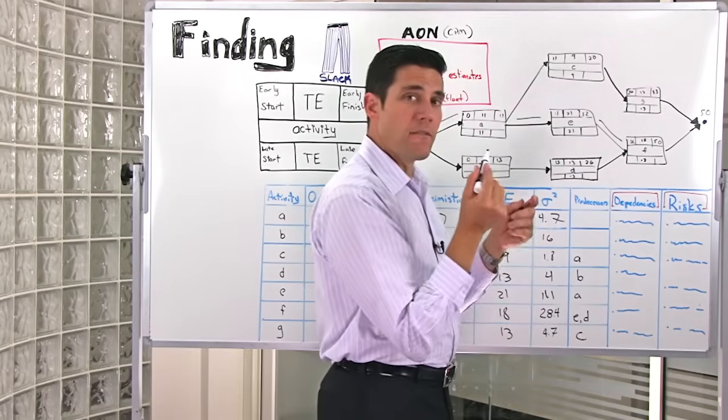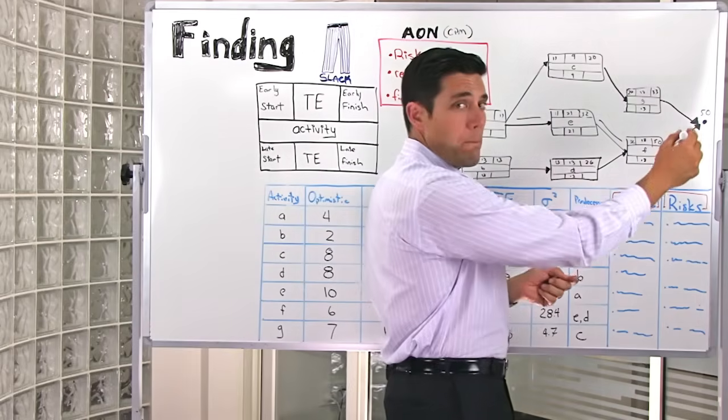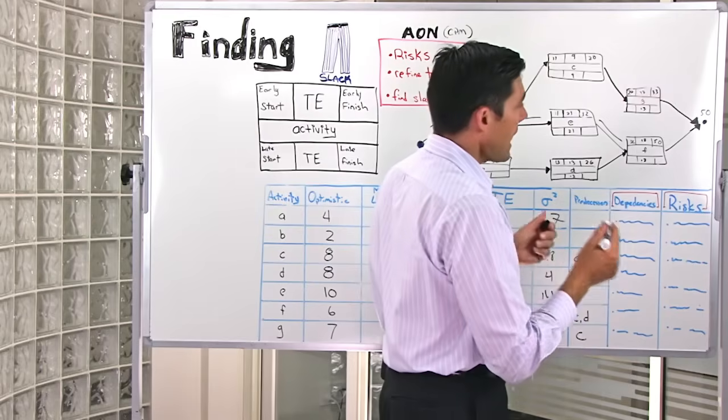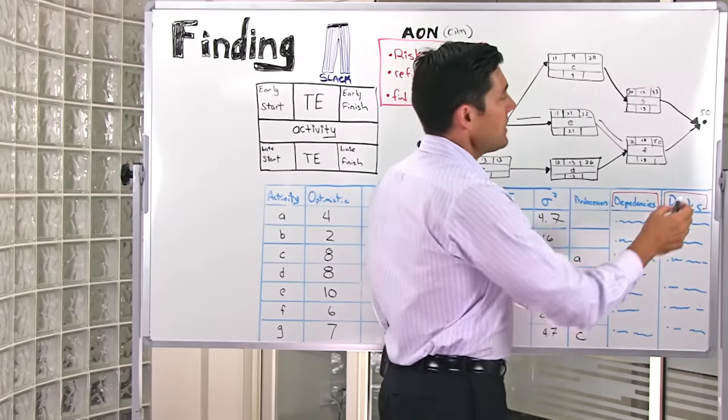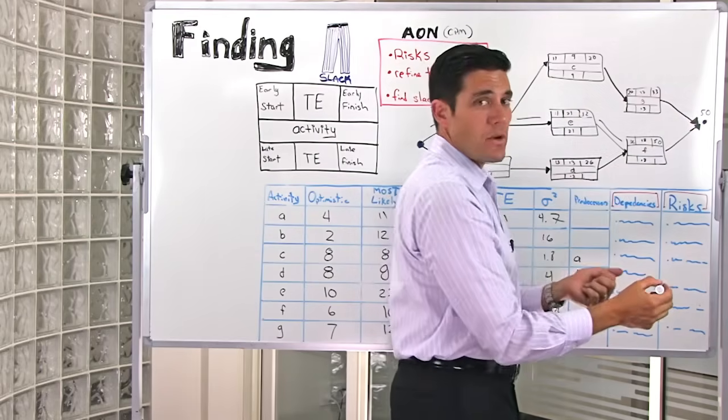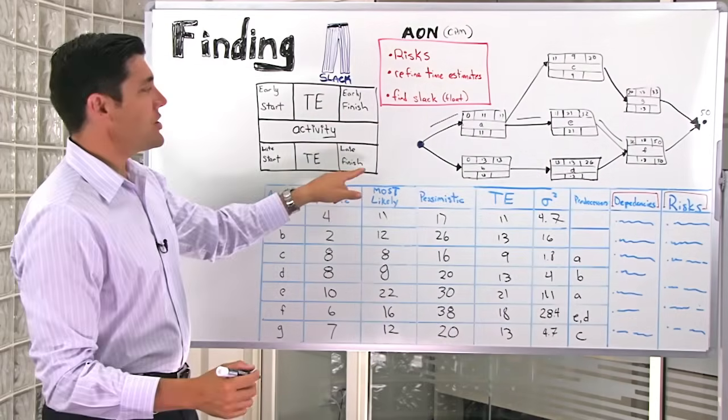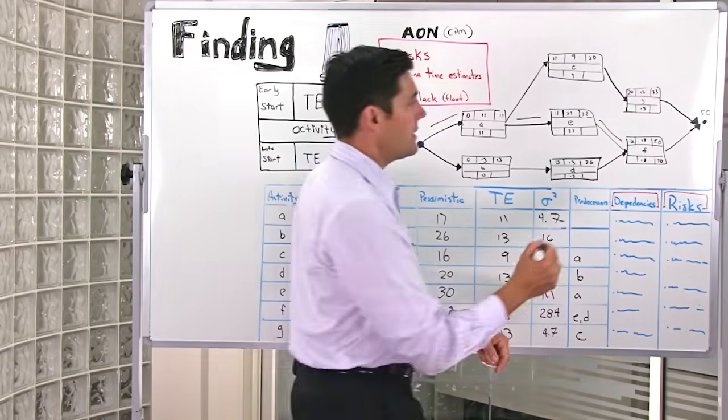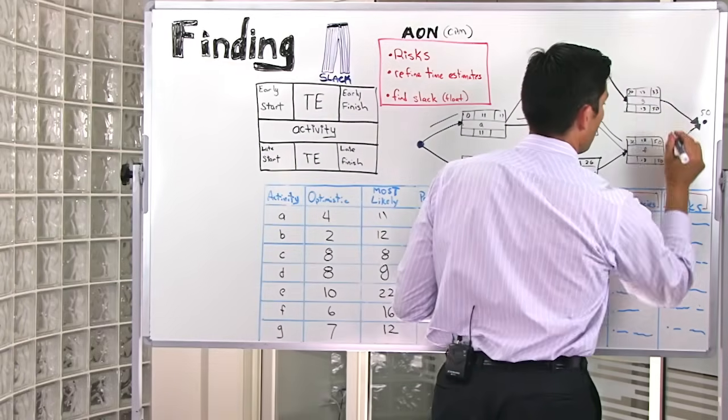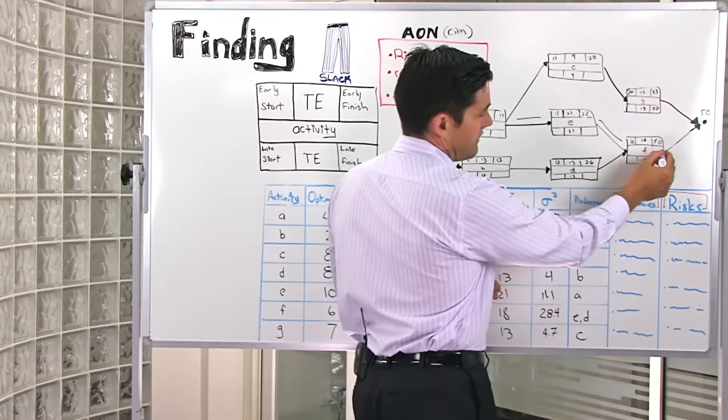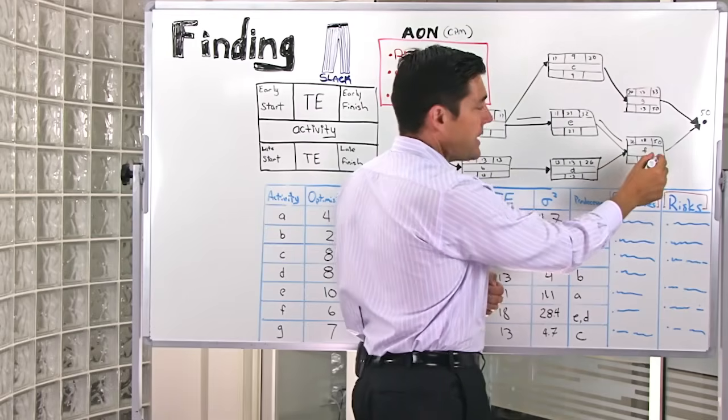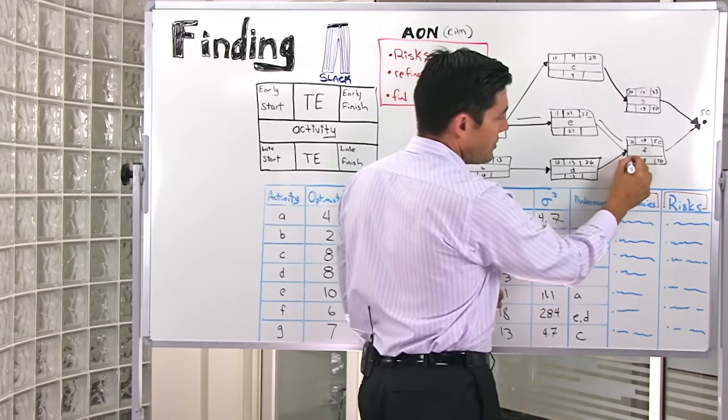Let's go back and calculate the slack of the schedule by going backwards through the network. How do we do that? Well, quite simply, the earliest time that we can actually finish the project is in 50 days. So we put a little 50 in the late finish for each of those two nodes at the end. Then, since this is the same here, 50 days early finish, 18 days to finish.